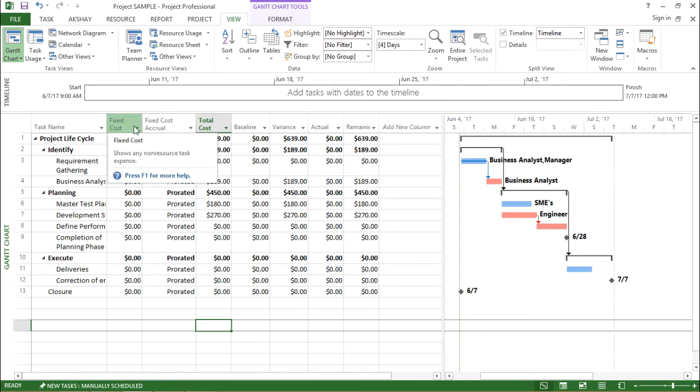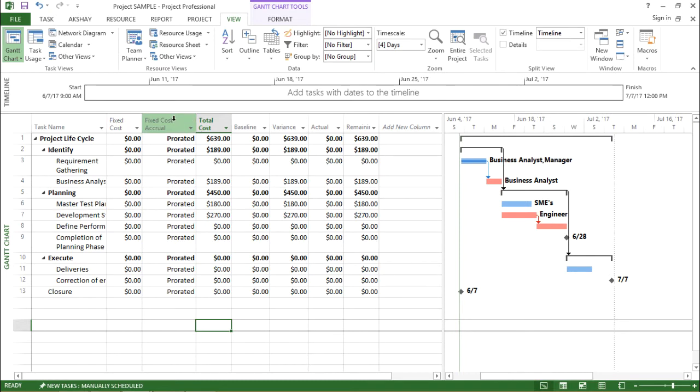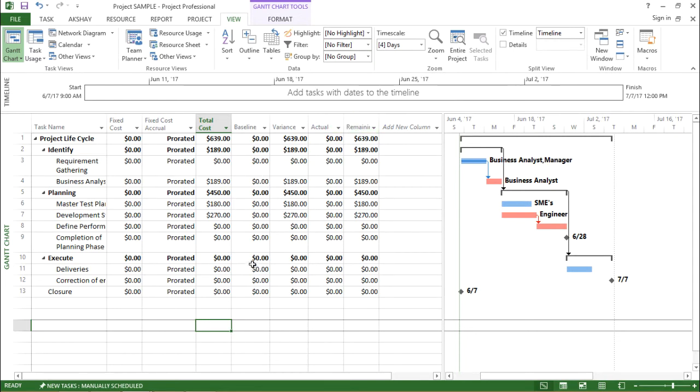Now it shows me fixed cost, fixed cost accrual, total cost, baseline, variance, and actual and remaining. So basically it is showing me what are the costs which are involved with a certain project.